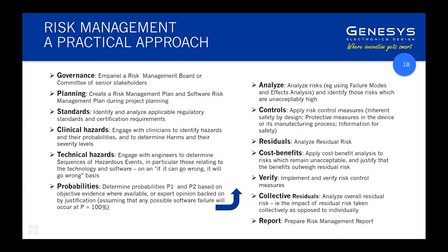Extremely important. Now, of course, a lot of the hazards and risks are associated with the applicable standards. So another planning activity you should be doing anyway is identifying all the technical standards that apply and their applicability. But in doing that, analyze them to see where risk comes into play, either explicitly in those standards or by implication.